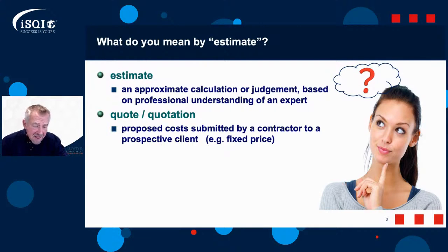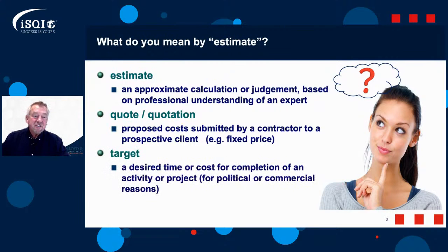So when our managers ask us for an estimate and we give them an estimate, then it's taken as a quote, and then that's put into stone. Okay, so we can't change it. You said it's going to be this long, so therefore that's what's in the schedule, if you're lucky. If you're not so lucky, your estimate is usually halved. So it becomes a target.